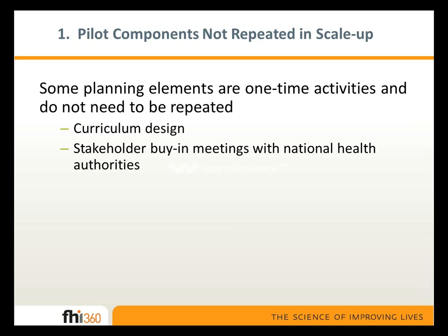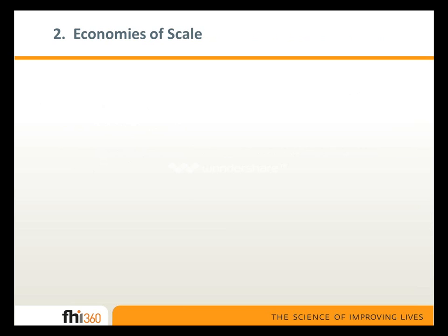Secondly, often to carry out a pilot project, you need to get stakeholder buy-in at high levels of a national health system. And so once the Ministry of Health has given its blessing to the pilot project, oftentimes when you're ready to scale it up, you don't have to go back and ask for approval again. So those costs wouldn't be included in scale-up costs.